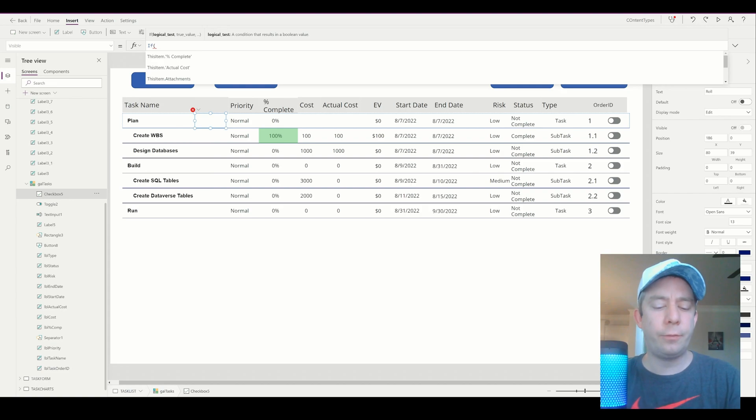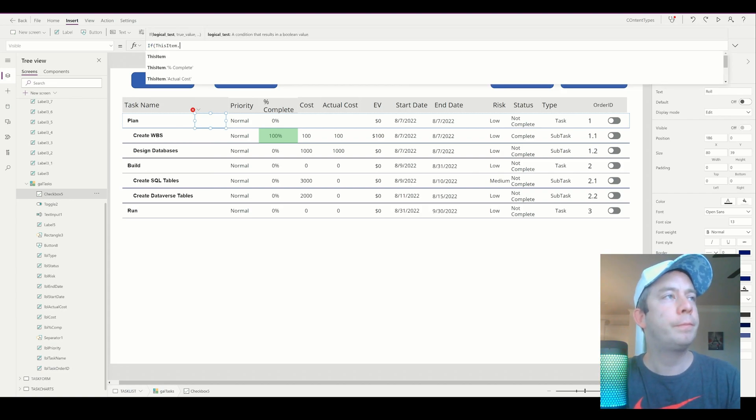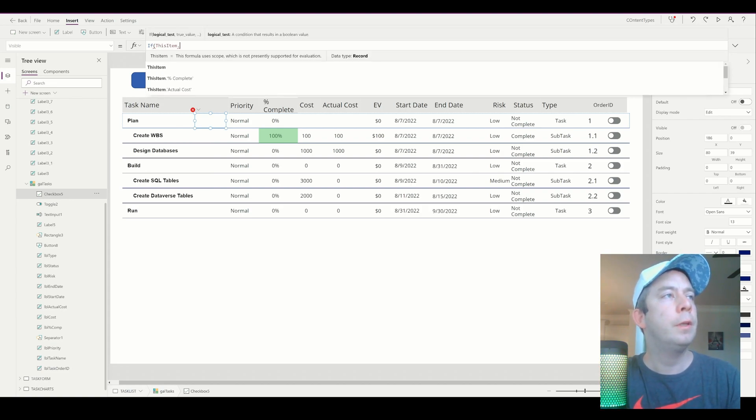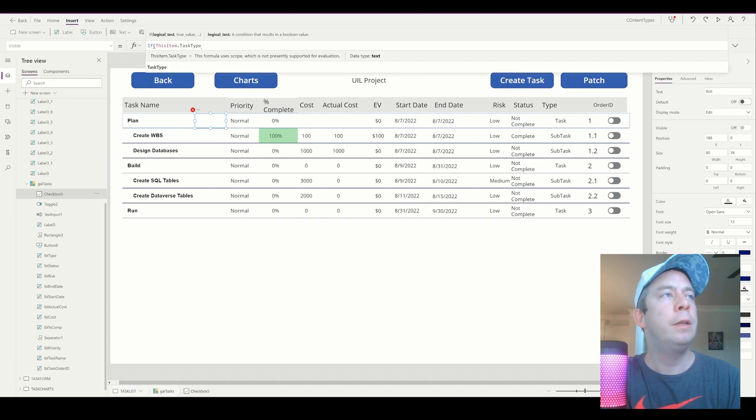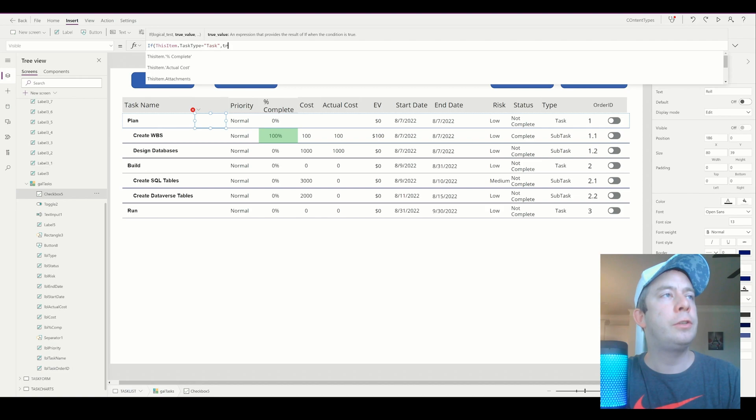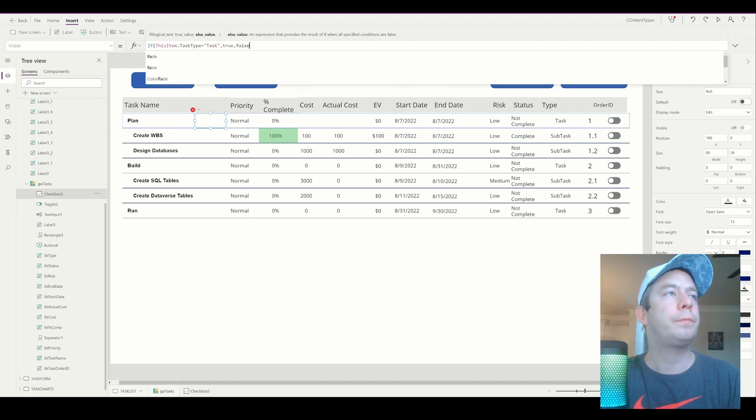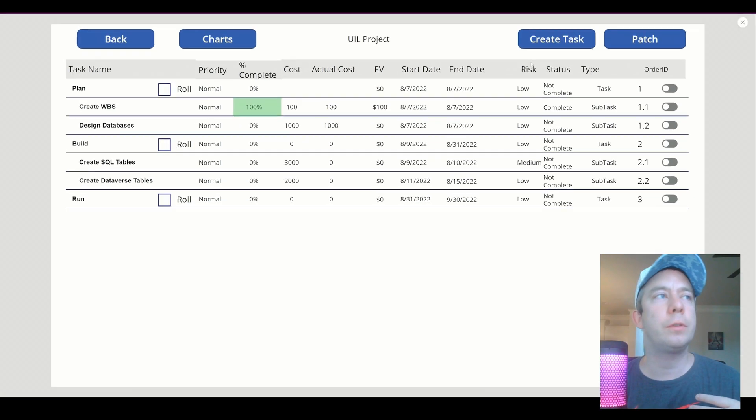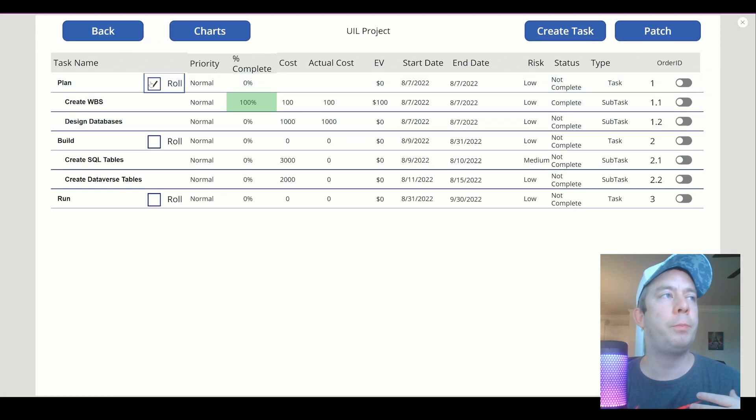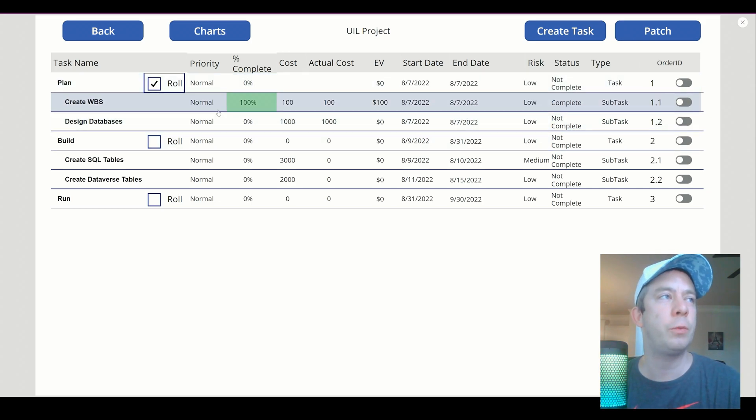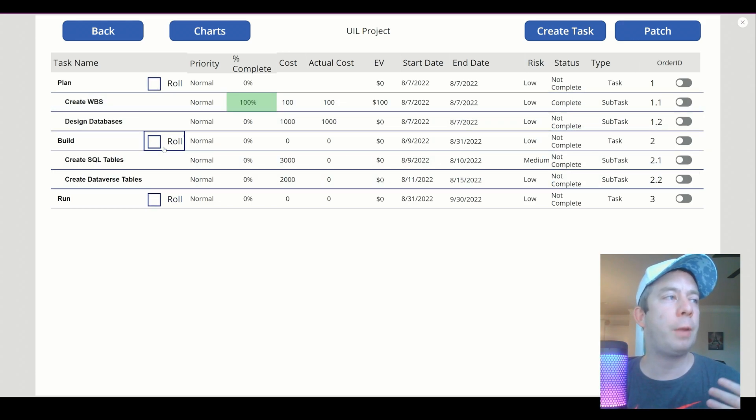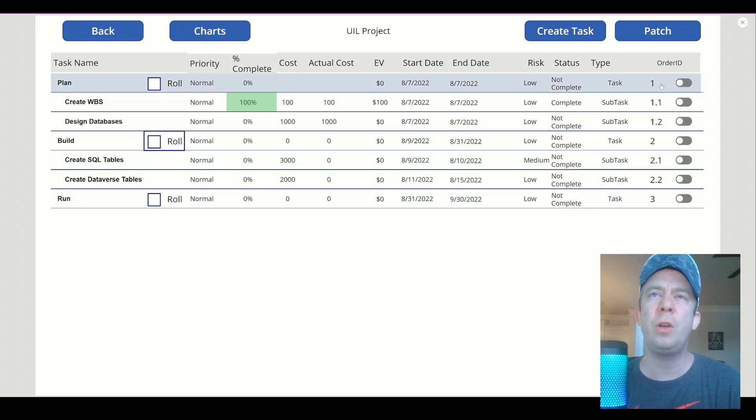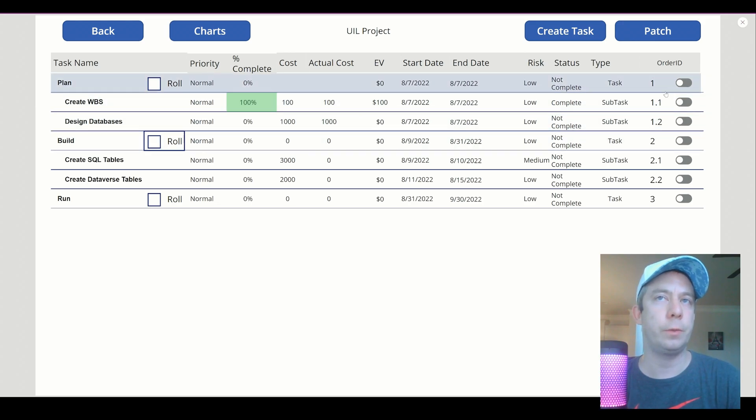This is very similar to Microsoft Project or some of your other project tools out there that you might use to create a task list where it will roll up. Now the first thing I'm going to do is create a visibility. I only want the ability to roll up if this item.task type is equal to task. Then it's true, else it's false. So I only want the roll-up checkbox to appear if the task type is a task. If it's a subtask, we don't want it to roll up. That's how I'm going to start this off. So we have three checkboxes now, and each of these are on our tasks. And if you notice the order ID, there's no decimal here. For the subtasks, we have decimals.